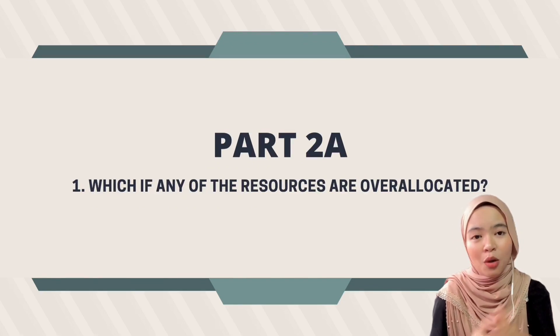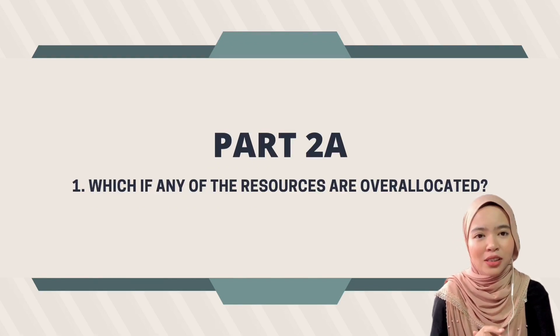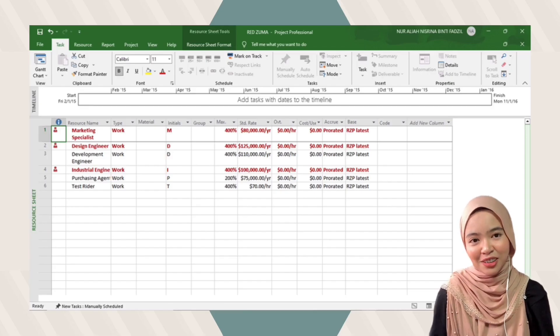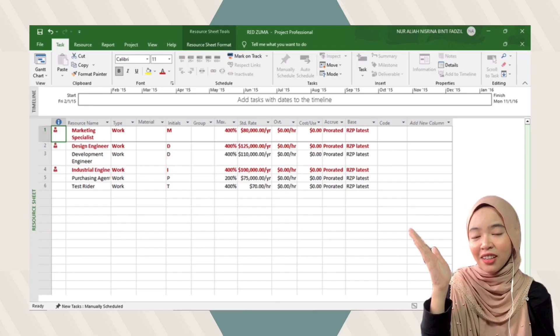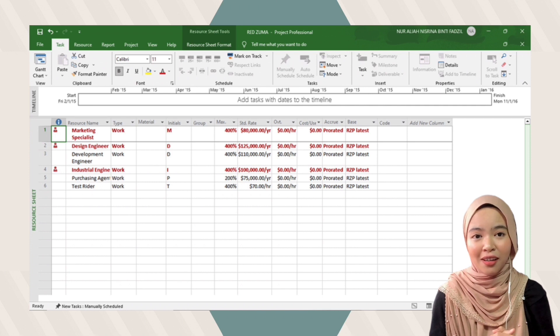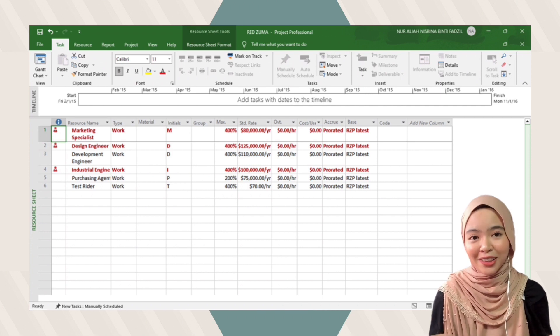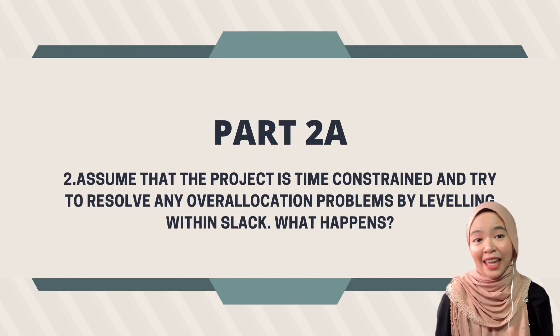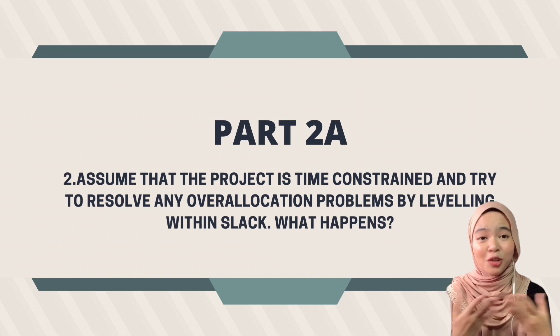Hi everyone, my name is Nisrina, and I will proceed with Part 2a. The first question is: which, if any, of the resources are over-allocated? After analyzing the resource sheet, the over-allocated resources from our project are the marketing specialist, design engineer, and industrial engineer.